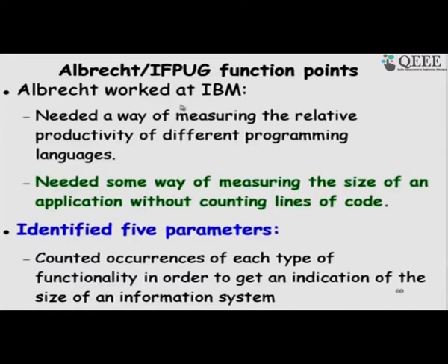Albrecht worked at IBM, and he understood that lines of code has problems as a size measure. The major problem is that lines of code can be accurately counted only at the end of the project, after the project has completed, but at the beginning of the project not even a single line of code has been written.